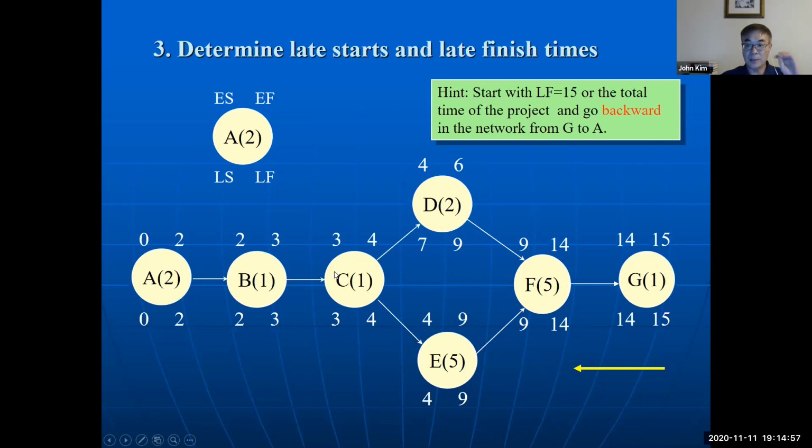If they are delayed, then the project time is delayed. But even if this one is delayed by up to 3 weeks, the entire project doesn't delay. So this one is a non-critical activity. The others are critical activities in this project.